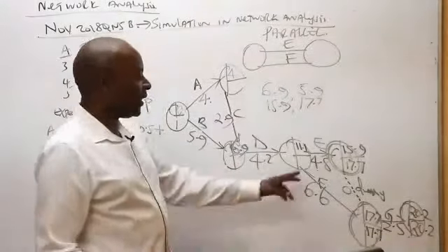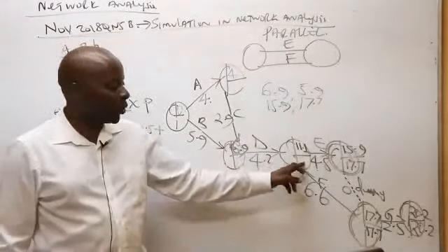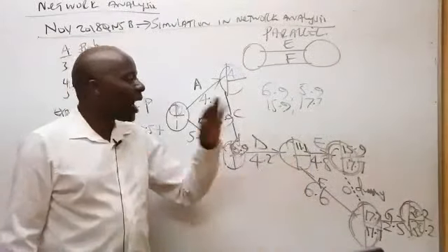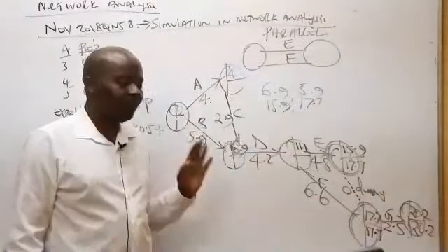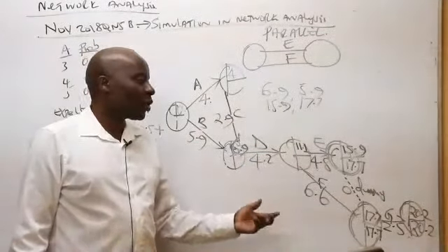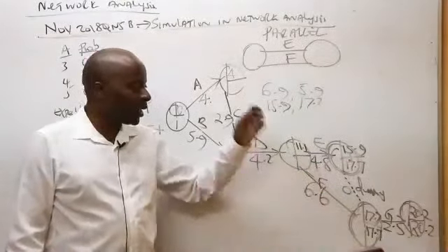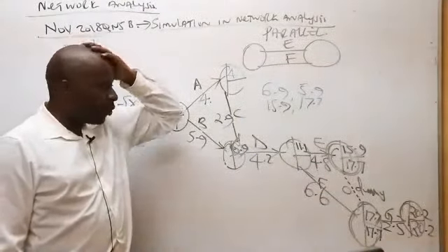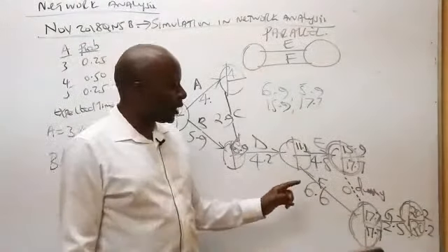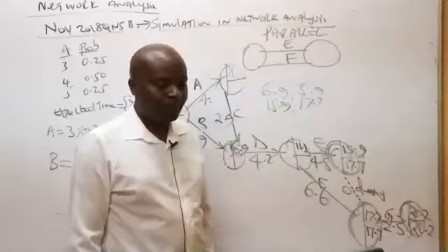Ladies and gentlemen, look at this. This one here is a funny one. Why? Because there are two arrows moving backwards into it. I will not panic at all. I'll just calculate their two time differences. So I'll have here 17.7 minus 4.8. Somebody has to give me this figure. What is 17.7 minus 4.8? Somebody using your calculator.